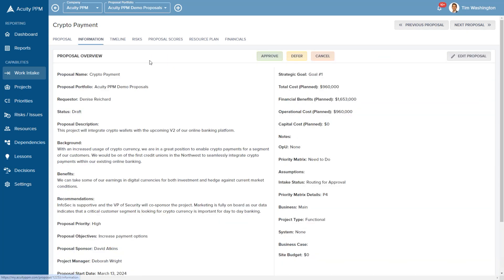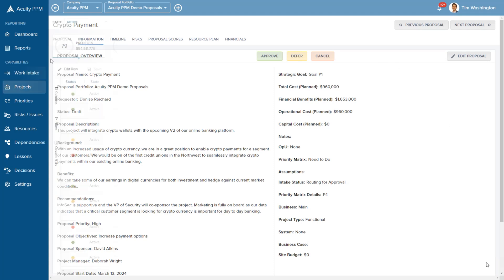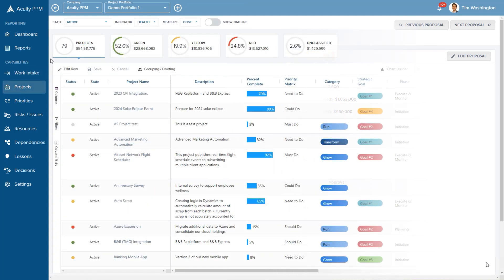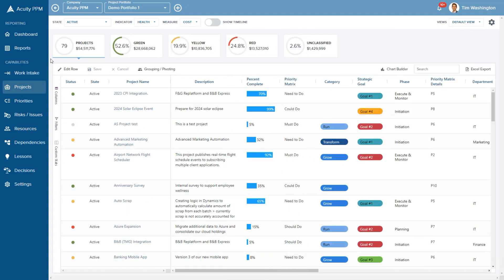Decision buttons make it easy to approve, defer or cancel proposals. With Acuity PPM you can track when and why decisions were made. When a proposal is approved, it becomes a project.